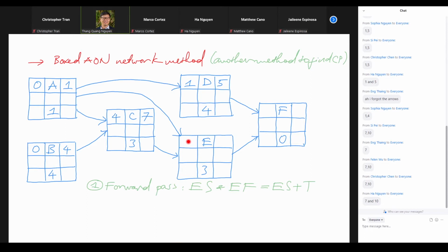Because in this case, remember, E is the catering. We have to know the date. So there's 1 arrow from A. And then we also have to know how many guests that would be, right? So the requirement before E is A and C. So you need to look at the end of A and the end of C, right? The end of A is 1 p.m., the end of C is 7 p.m.